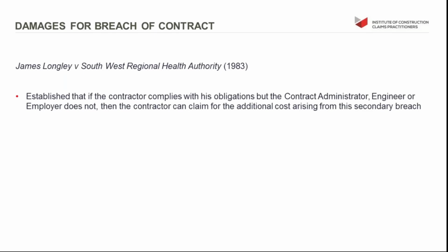And again, we go back to the case of James Longley versus the South West Regional Health Authority. What that did was establish that if the contract administrator didn't comply with his obligations under the contract, and it caused the contractor who had complied with his obligations to give notice and provide the information for review, then the contractor can claim for the additional costs.